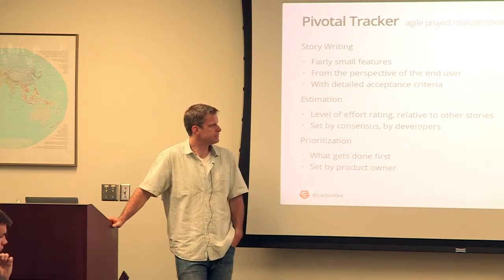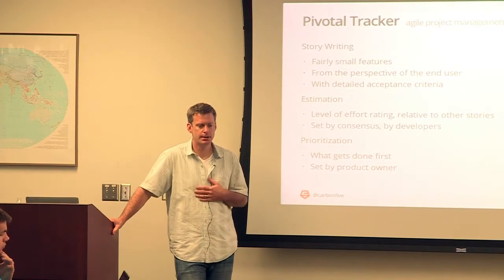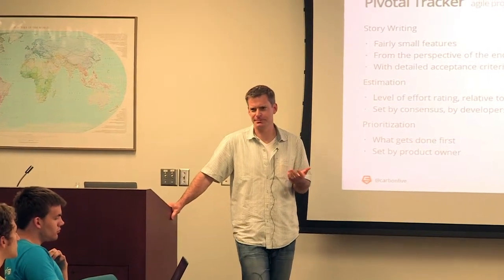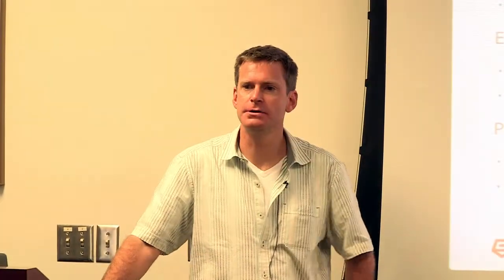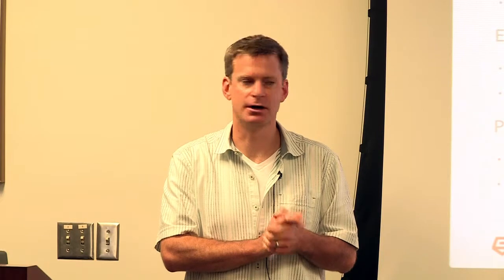So you can use Pivotal Tracker as sort of a glorified task list. It's a little hard. I've been using this tool so long that I'm like, no, wait, it's super easy, but I've been using it for a decade, you know what I mean? So I think you're fine using something simpler until it's important that you take a step back periodically. We formalize this in our projects. We do things called reflections. That's another Agile thing. We do them every 2 weeks or every 4 weeks, where you take a step back and you go, all right, what's going well and what's going poorly on this project?